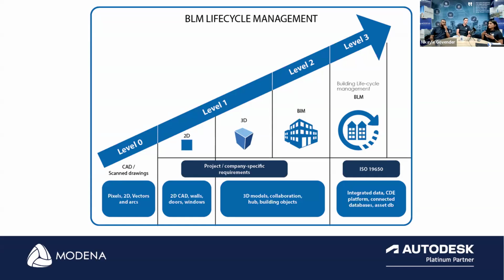There's a lot of firms who think, yeah, we've integrated BIM, and for them, that's just 3D drawings. That's not what BIM is. BIM isn't Revit. 100%. I constantly tell people that BIM is not Revit. And then your level 2 is where you're integrating into BIM, where you're now using your 3D model to do things like collaborate and clash detection.